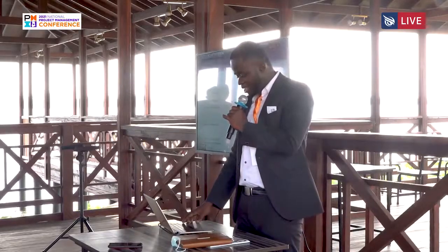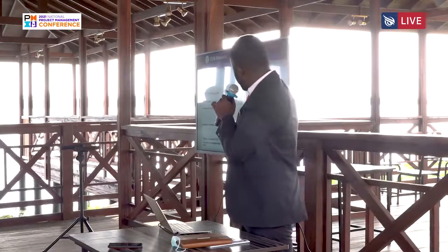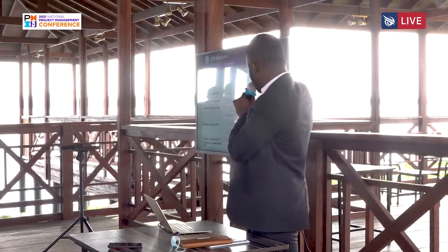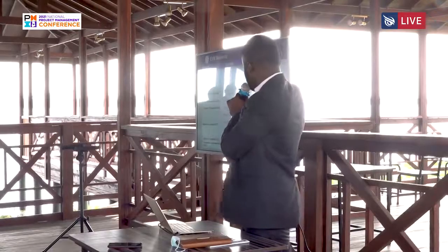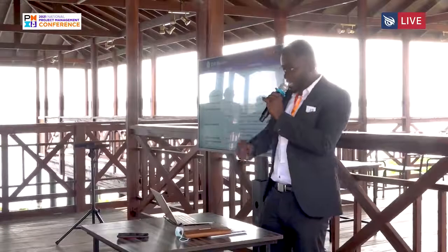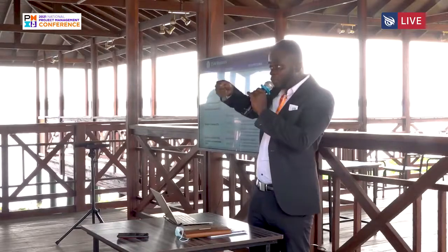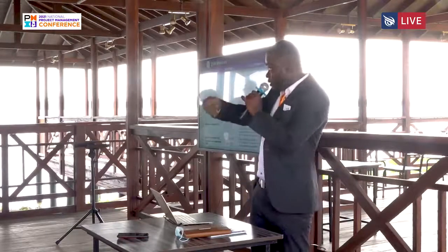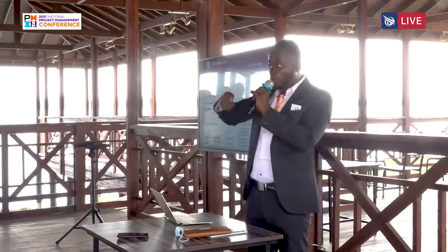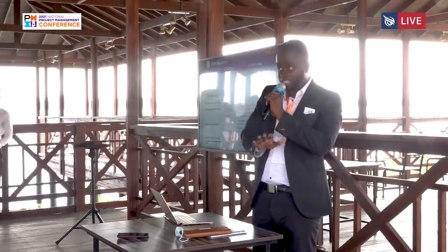The EVM measures. So these are a list of EVM measures, but my favorite one is the estimate at completion. That is the calculated completion time for the project if work continues at the current pace. So if we continue to work as we are doing now with the air conditions, this parameter will give us our completion time. So probably we plan to finish the project in 10 months, but with the current pace of work, this parameter will give us how long we will actually take to complete the project if we don't change our ways of executing the project.